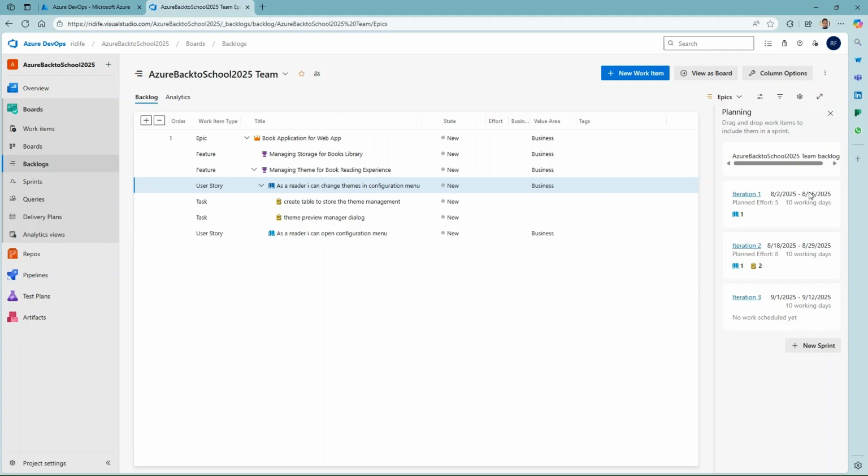The rule of thumb is the iterations should have the same time box, which means the same planned effort. But the real question is how many stories we can put in an iteration. In order to answer that, you should follow the velocity, or historical velocity model, based on your team. So if in 2 weeks the team can only solve about 10 user stories, the velocity is 10, and you should put 10 user stories in each iteration.